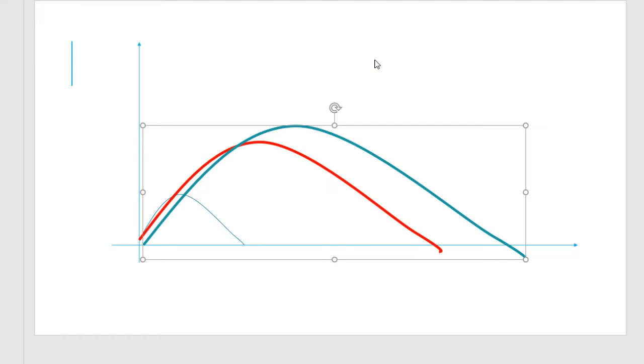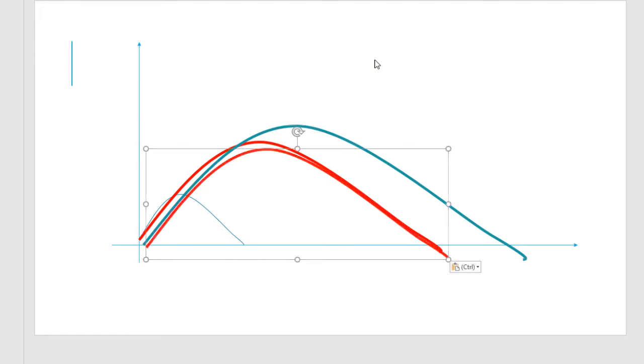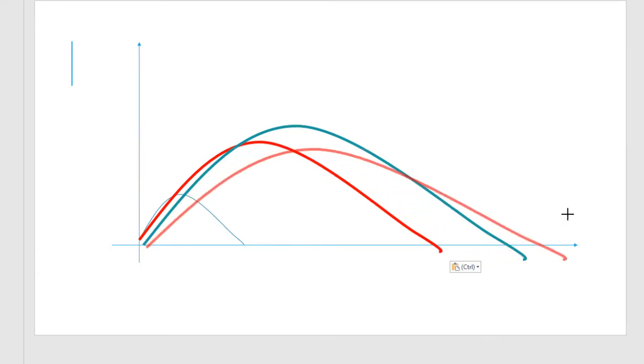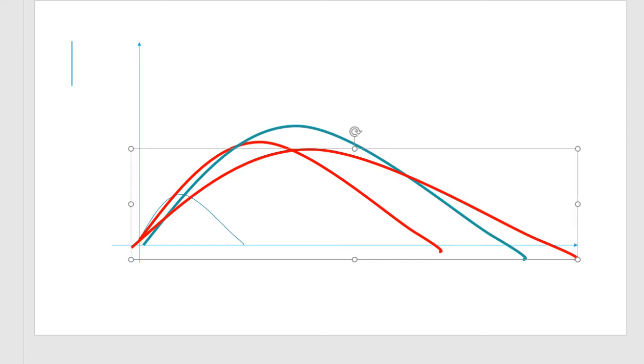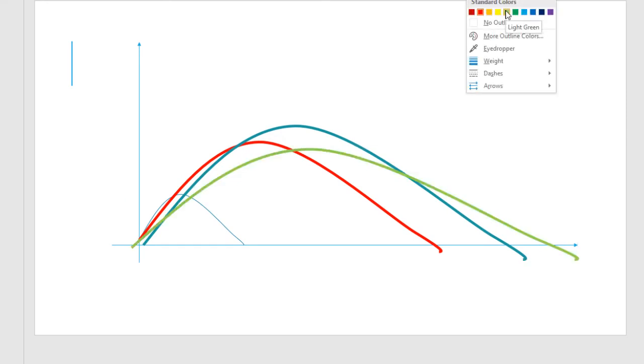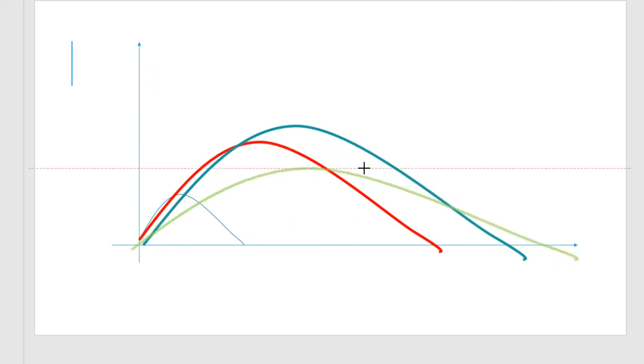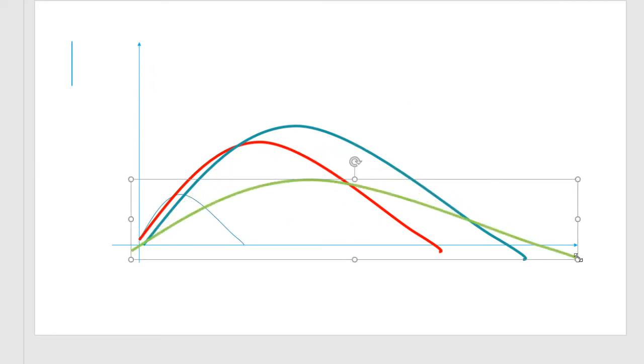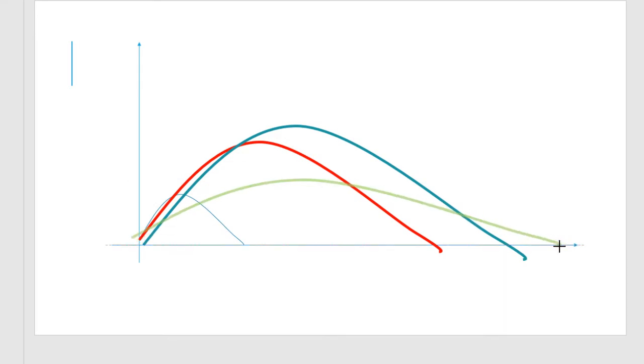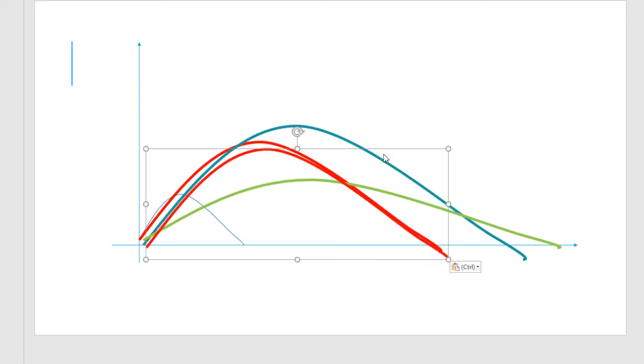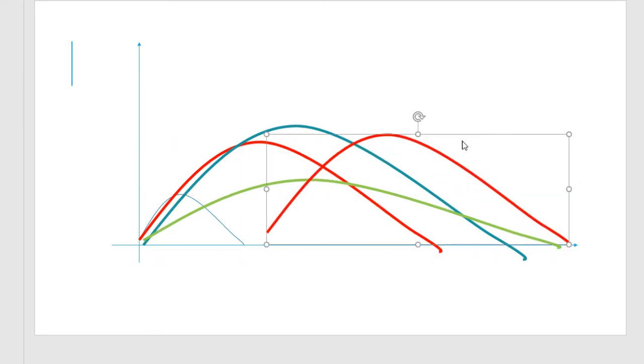Monitoring and controlling, as you can see, it spans across the entire project. So you've got something like that for monitoring and controlling. And what this is showing you, Mario, is monitoring and controlling change requests and so on. It spans across. Up to the very end, you could still be involved in dealing with change requests. You see that? And then when you take a look at closing, it is very similar to what you saw in the beginning with initiating.